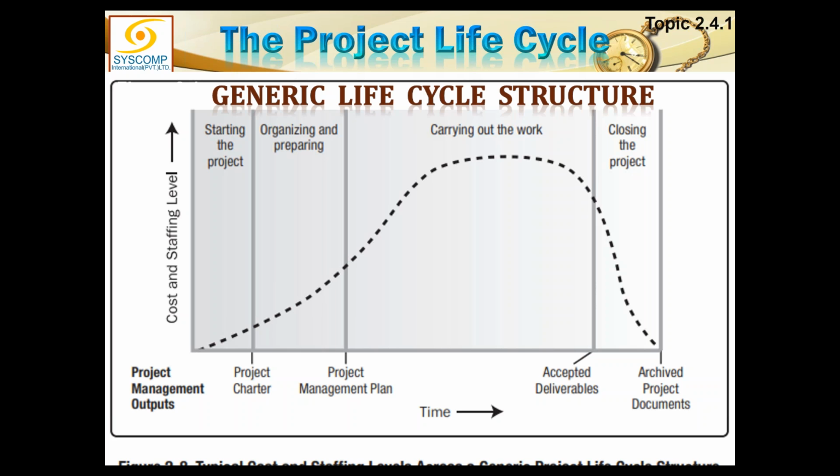If you want to do it in the shape of a cumulative graph, that would be how much money has been spent so far. That would make a completely different graph. And that graph is usually called an S-curve. We will not talk about it right now, but later on in cost, we will discuss what an S-curve is and how it is made.